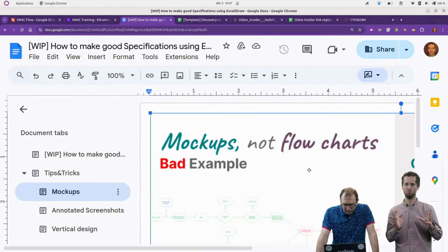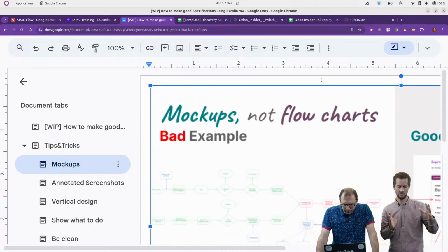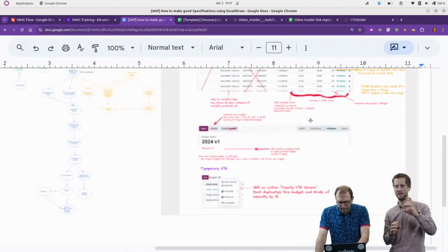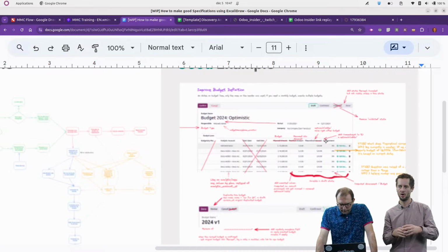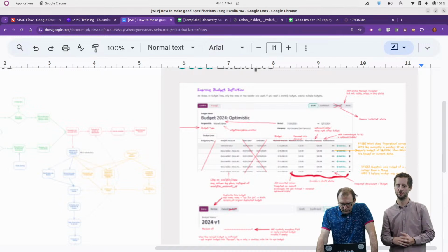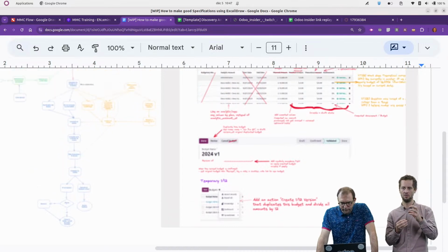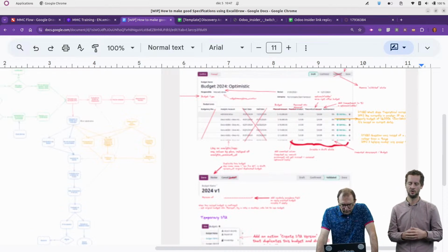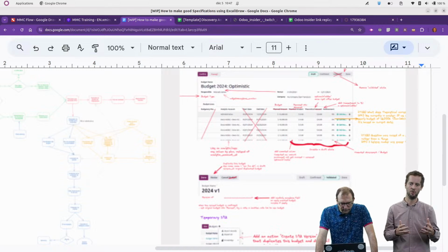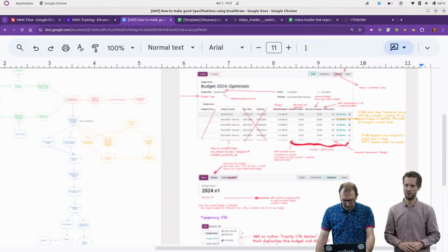Here we want something visual, ensuring that the way we design and think the solution is workable and not super expensive or super complex to use in Odoo. Having something visual really already changed the way we thought about some elements in the analysis, because we saw that some standard features can do the job, or that the solution we designed in this phase was too complex and almost impossible or unrealistic compared to the way they operated before.